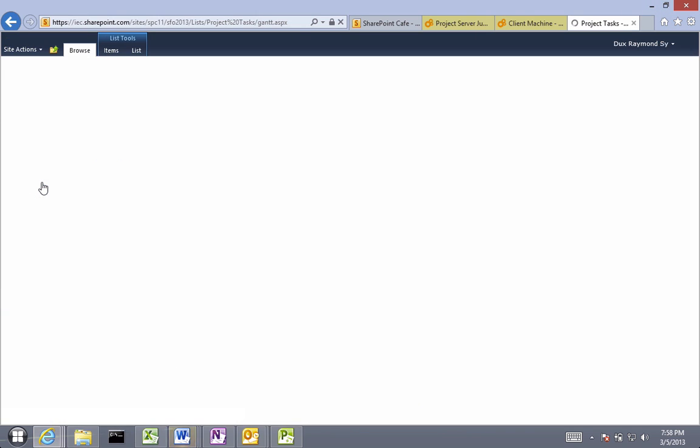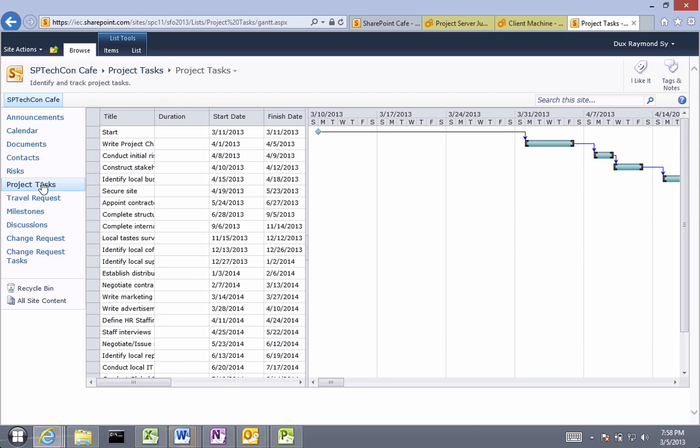And I tell my resources, okay, go update your time. It could be percent, it could be hours, however you track. You can synchronize every column in Microsoft Outlook. By default, it's synchronized to default columns: start, end date, percent complete. You can start doing baseline, track actuals, do all that stuff.